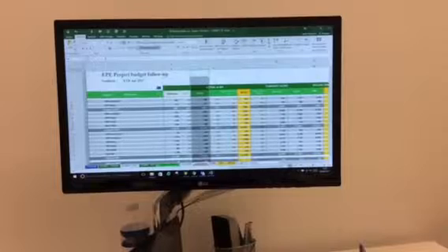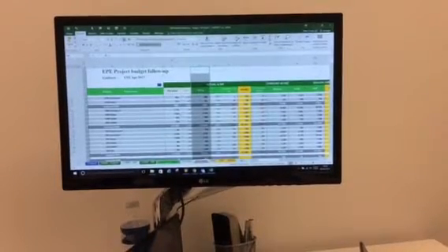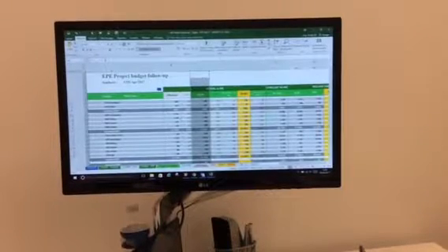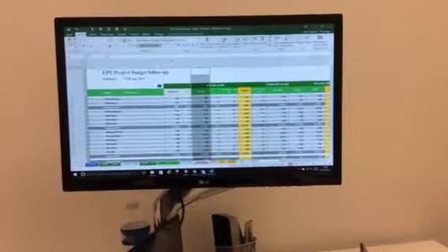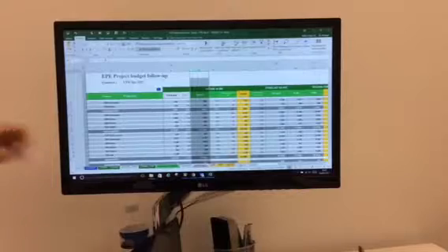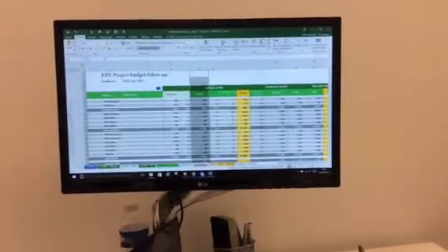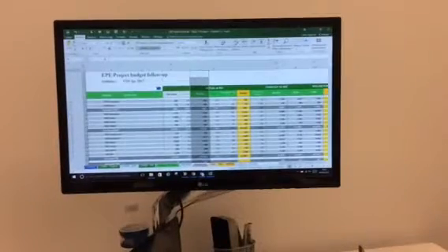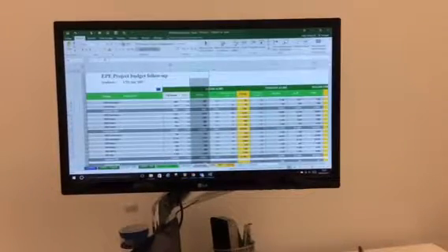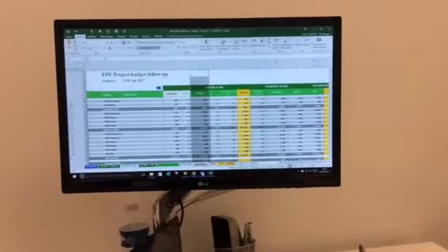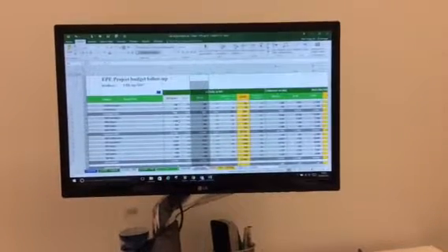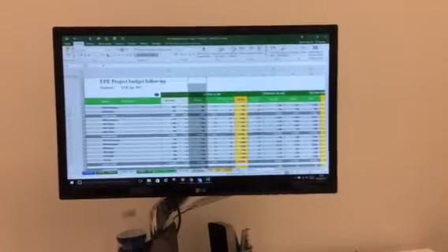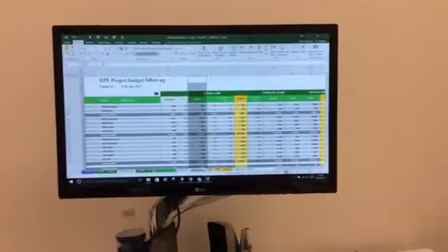And then you put that I need 1 person during the year. And then that is the first point of view. And the second point of view is for the resource manager. He will say, okay, in my team I have 20 people, for example, and I will have 1 person working on EcoStructure, another person working on the PEP switchgear, and so on. And at the end of the day, he will say, okay, I have 20%, but I have a request for 25% or for 15%. Then he can manage how to reply on all the requests.